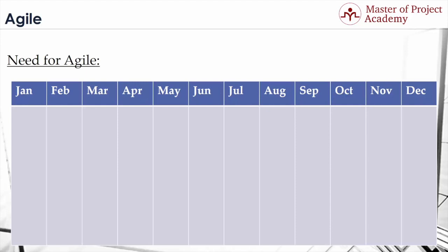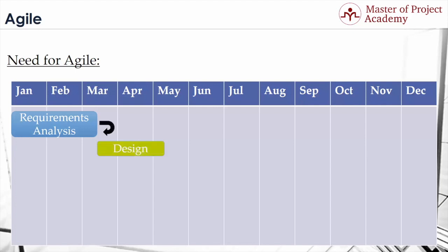If you consider a 1-year project in conventional project management methodologies, the first step is requirements analysis. At this step, customers' requirements for the project are gathered, evaluated, and finalized. Upon completing the requirements analysis phase, the design phase starts. At this stage, based on the analysis, technical design of the software and applications is done by the software engineers and software architects. Infrastructure, technology, services, tools, and more that will be used in the project are designed at this stage. And then, software development starts.